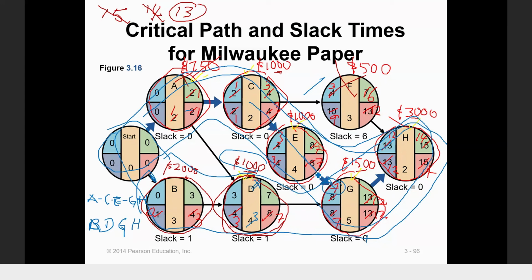So even if you reduce here, say you reduce 3 plus 3 to 6, you have 6 or you have 7. Definitely you're going to have 7. So when you go 7 plus 5, it becomes 12. When you come here, 12 plus 2 is 14. So you still cannot get 13 if you reduce that,